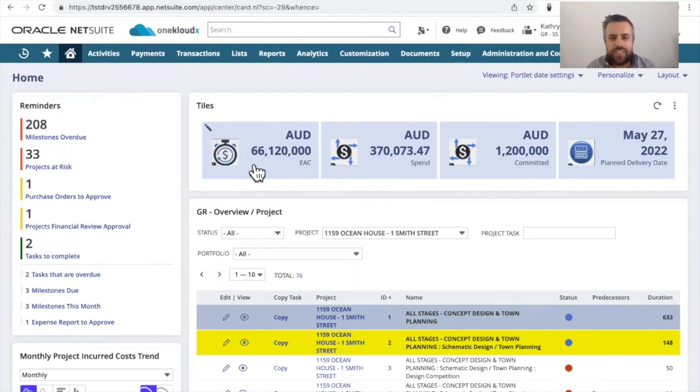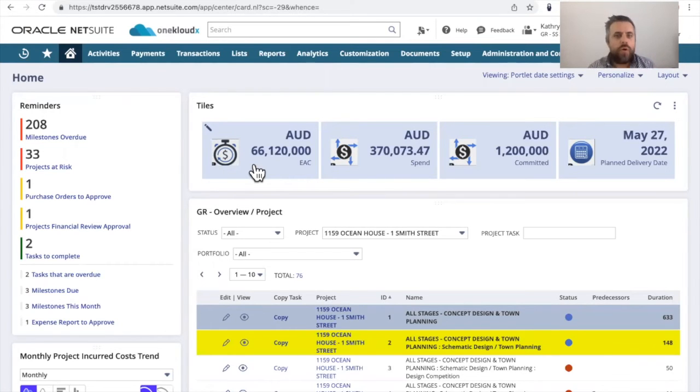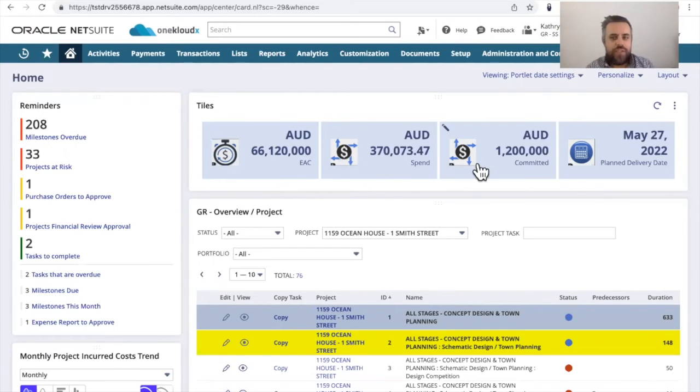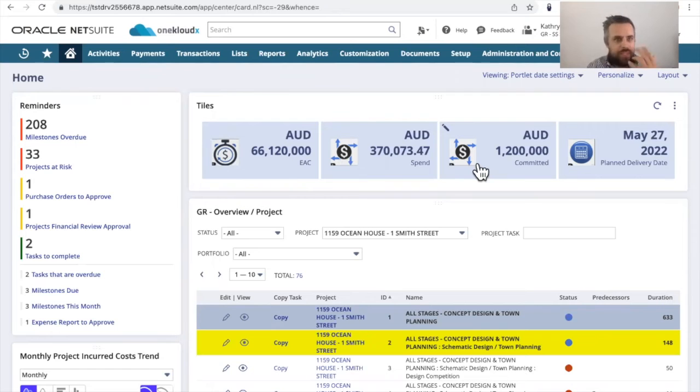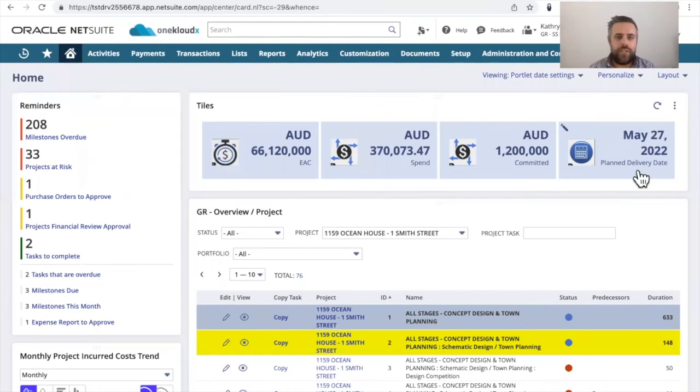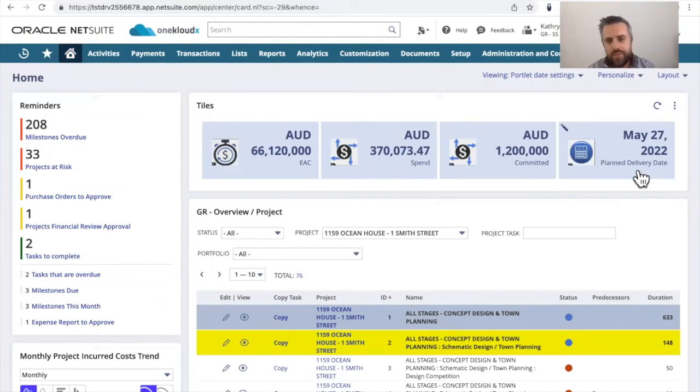This is an actual view for every single project, what we're estimating the actual cost to complete versus the current spend today versus all the actual purchase orders that have been in the system and applied, compared to what the actual plan delivery date is for those projects that you're consolidating and viewing at a portfolio level.